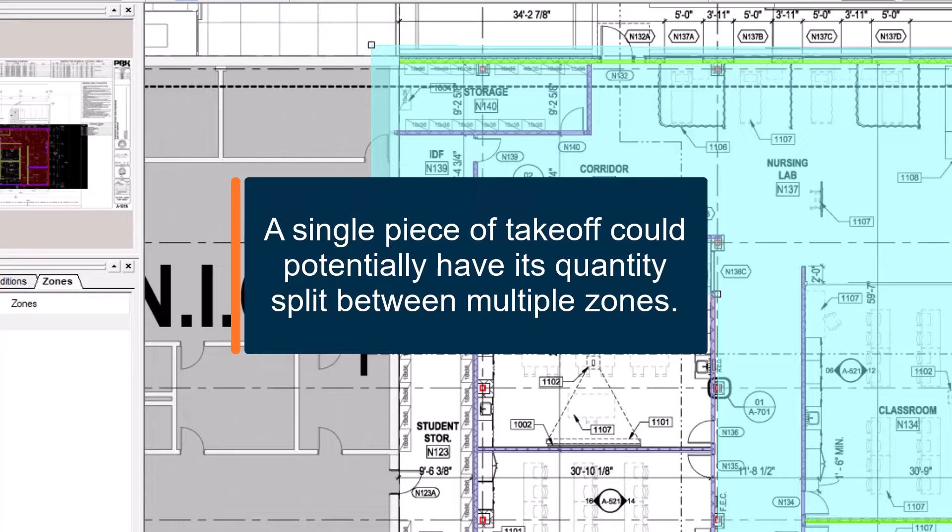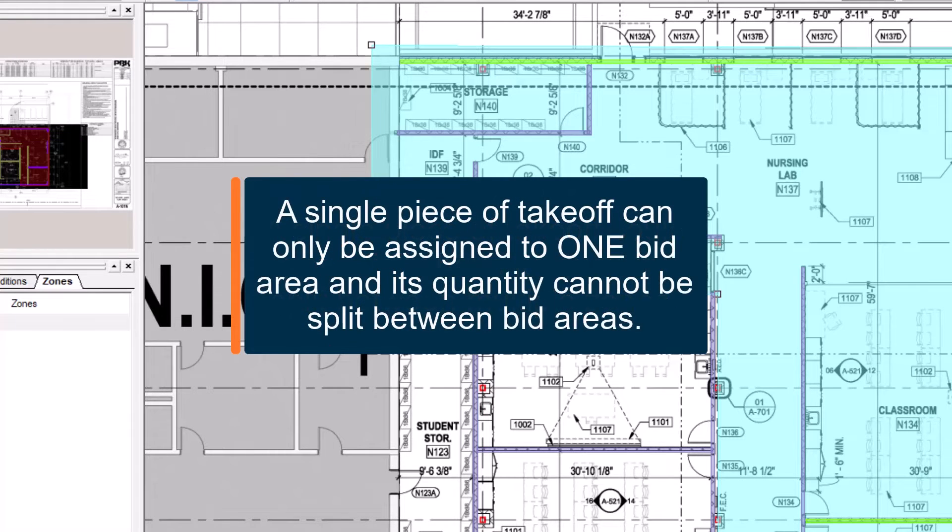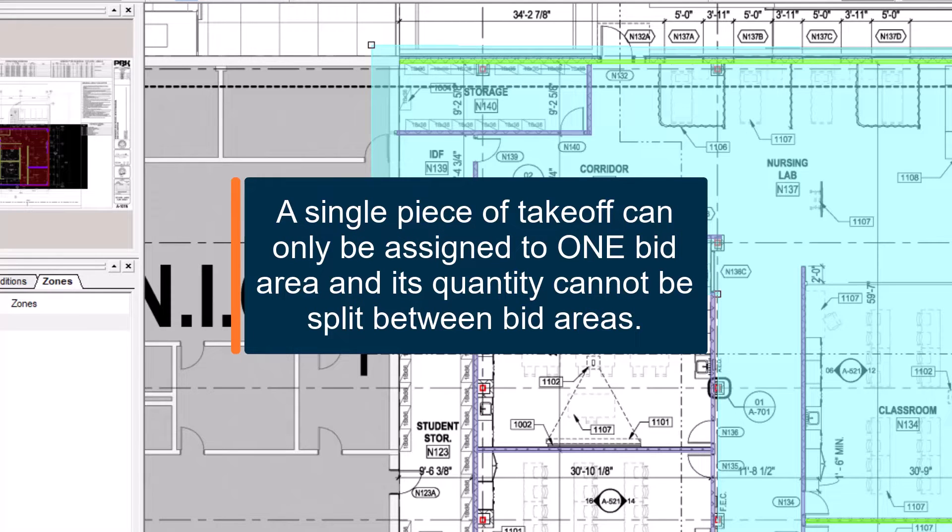This is in stark contrast to using bit areas, where a single piece of takeoff can only be assigned to one bit area, and all its quantity is assigned to the area.